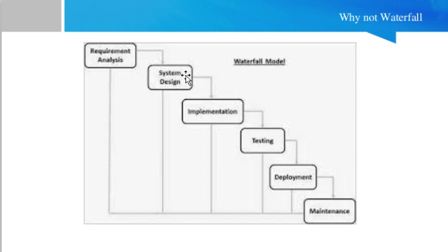Then the other problem here is that once all the implementation or development finishes, then the testing will start. Testing means quality assurance from the vendor team or user acceptance testing by the customer. For example, you are implementing a system, and once you have completed the whole development, you give the system to the customer for UAT purposes, and then you get the customer's feedback. For example, he is not satisfied with a module, or with the look and feel of the system. So whatever feedback you get from the customer comes at a very late stage, once all the development and planning is completed. In that case the rework increases so much. This is a very big disadvantage.